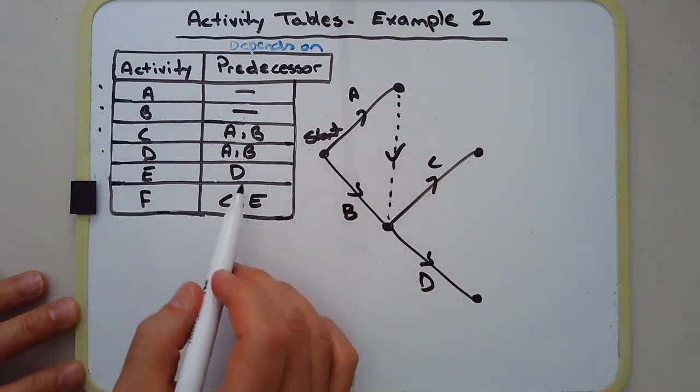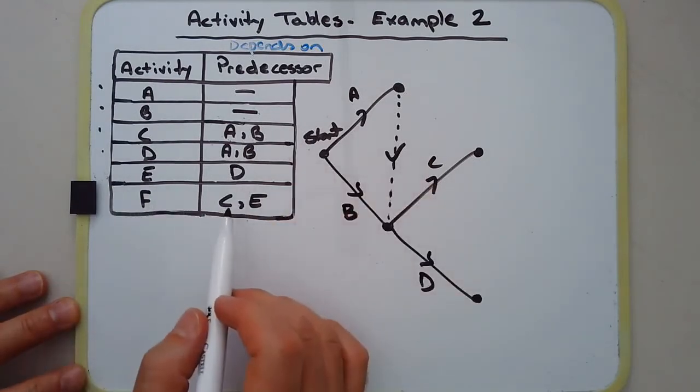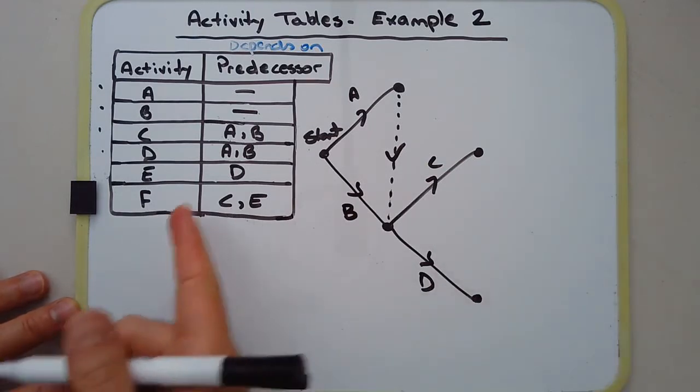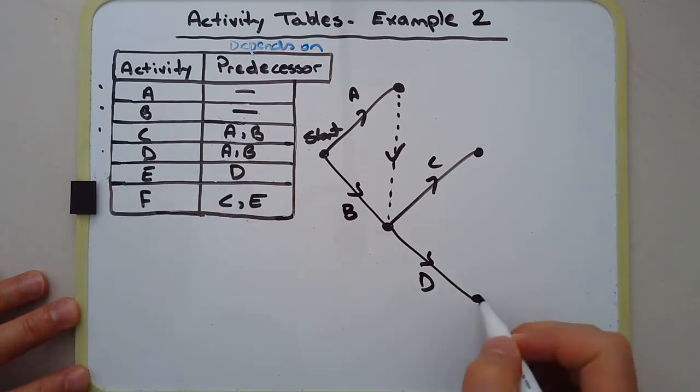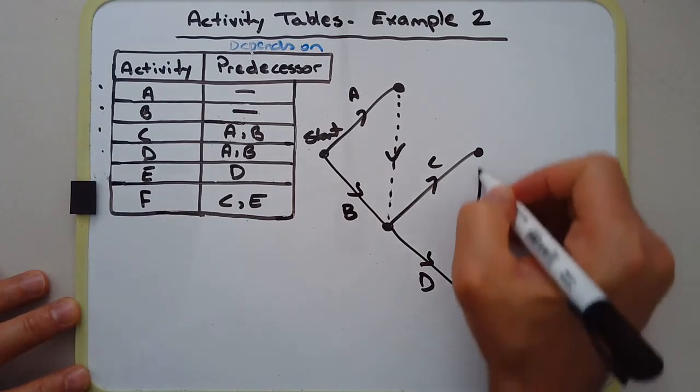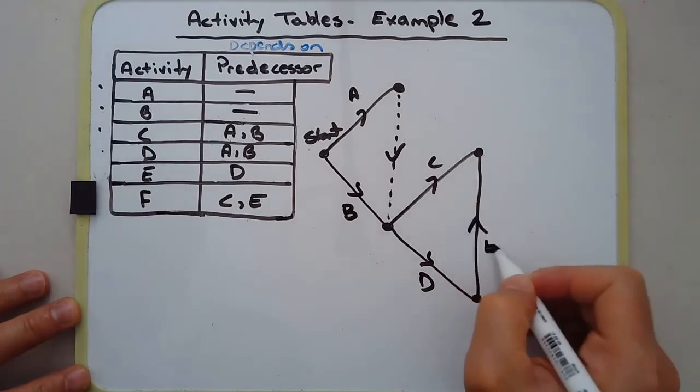Now E depends on D but F depends on C and E. Okay, so what I'm going to do is I'm going to draw activity E joining onto activity C. Okay, this way. So this is activity E.